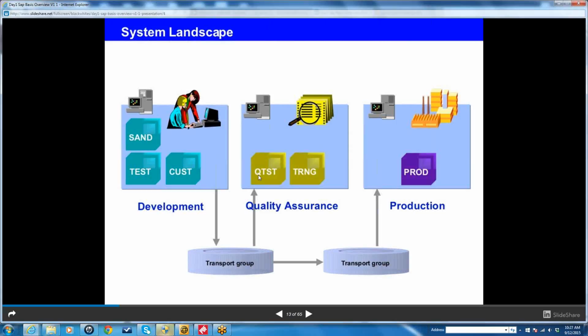Again, you have to redo the work we did in quality, bringing all the legacy data into the production system as of that date, validating the data, and bringing all the results if needed. If you are going live in the middle of the year, for payroll, all that information you have to bring and validate. Each functional area person is responsible for validating the data and making sure it is converted successfully with no issues, and then users will validate before the system is released to the end users. That's usually the project timeline planning.